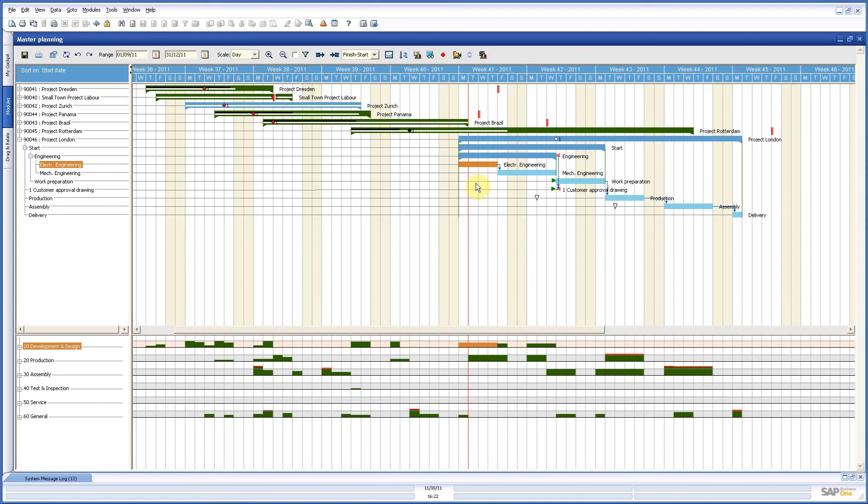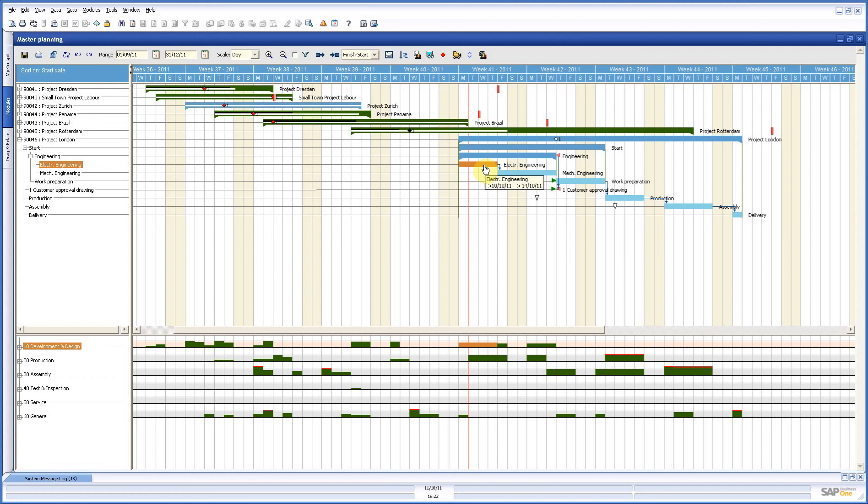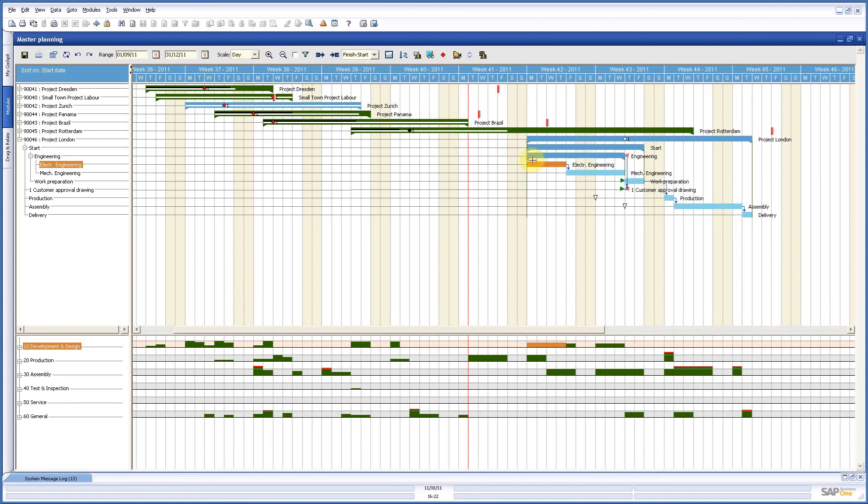Those are constraints and constraints make the planning dynamic. Now, we have three types of constraints. This one is the most used. It is a start-finish constraint which says only if this one is finished, the next one can start. That is the reason that when I put this to the right, everything moves to the right.